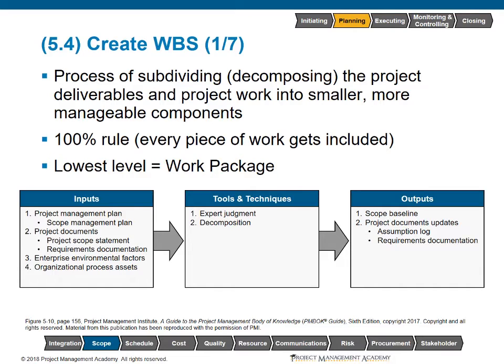So if the work is not captured as part of this process, then it won't be scheduled and it won't be funded. Now, does that mean that we don't have to do the work? No, we're still going to have to do it. But now it's going to be a matter of trying to go back and ask for more money. That's obviously not a good look as a project manager.